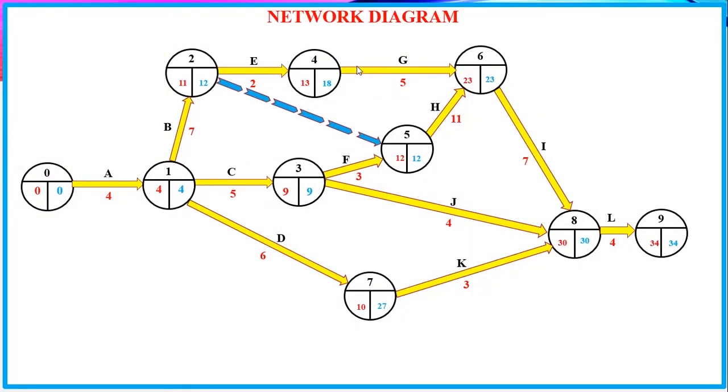After getting that, we need to combine the two so that we now have a complete network diagram, which was our requirement number 1. Draw a network. So when you are asked to draw a network, you have to show the EST, the LST, the event number, that is the event node number. You have to show all the activities and their duration.